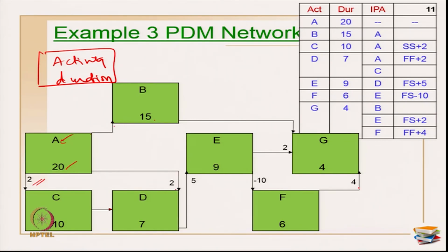Sometimes I may also have an activity name coming in here, then I have to use this combination only for that activity, and if there is something else given here, then the default relationship also has to be taken. Never try to overdo the relationships. Also, if a special type of relationship is given, then that only has to take the dominant role. If no special type of relationship is given, then the default finish-start will be the default relationship for the particular IPA, that you have to keep in mind.